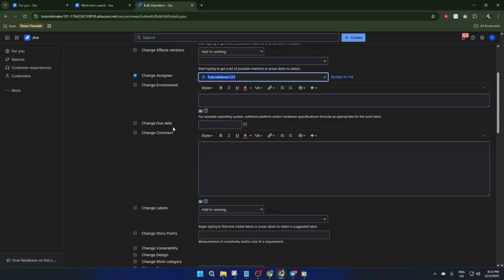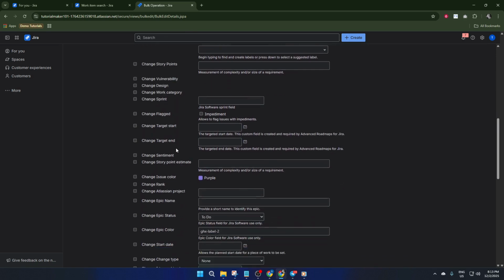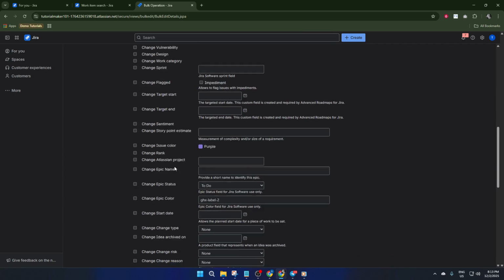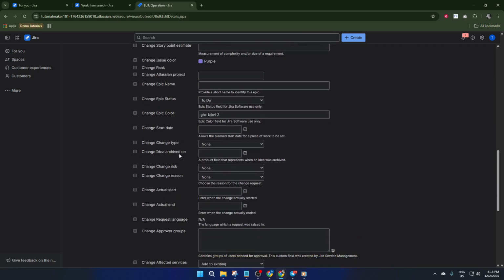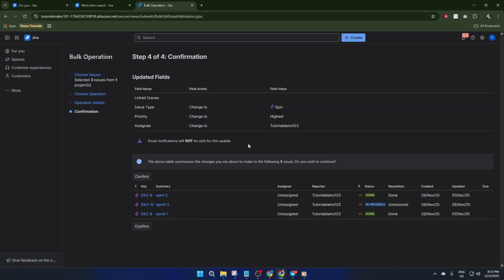After the process finishes, you'll want to double-check that everything went smoothly. Head to your new epic or feature and look for all the issues you just moved. You should see them listed there. For extra peace of mind, you can run the original search from step 1. Just swap in the old epic key. If your bulk edit worked, those issues should no longer appear under the old epic. Likewise, you can search for the new epic to confirm everything's in its right place.